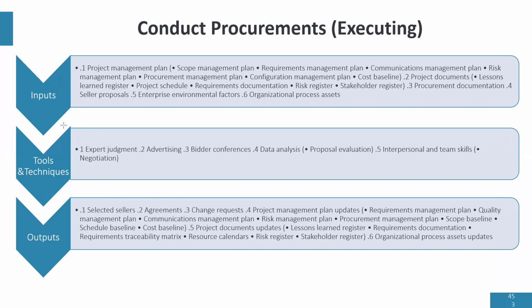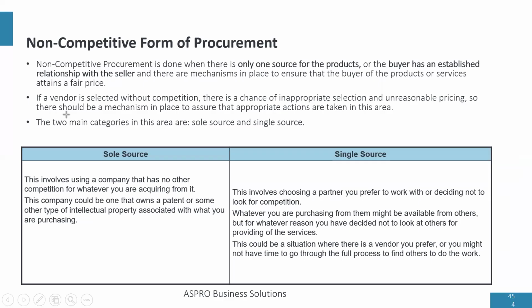But there are some contracts that are non-competitive. And I mentioned this earlier: sole source. So when there's sole source procurement, there's only one company that can do the job. Like Pete said, no other company can connect you to the grid. So anytime you have a project towards that area, there's no need to do procurement planning. Just find out their terms and engage. They are the only company that can do the job.